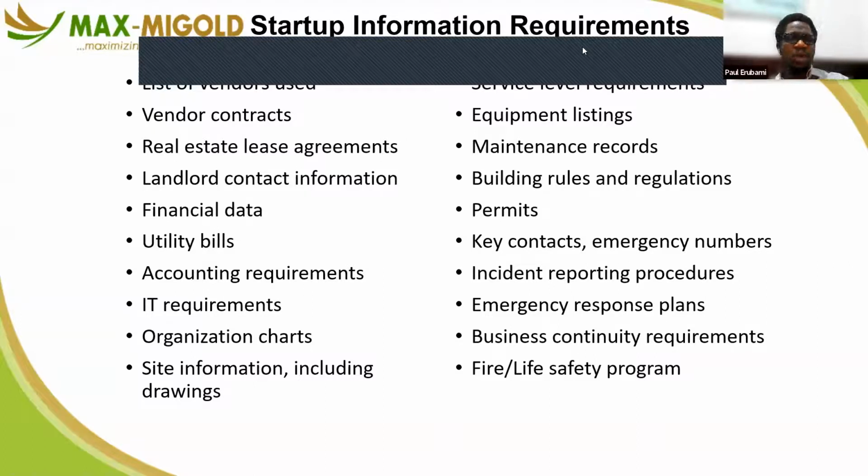If you need those documents and paperwork organized, and you don't have them, get a consultant to come in and work with you to generate the information pack. An information pack is very critical before you start thinking of how to outsource, because you cannot outsource what you don't understand. What vendors and contractors will basically do is see your scanty one-page information: come and provide us facility management, we want cleaning, we want catering, we want electrical, we want AC.